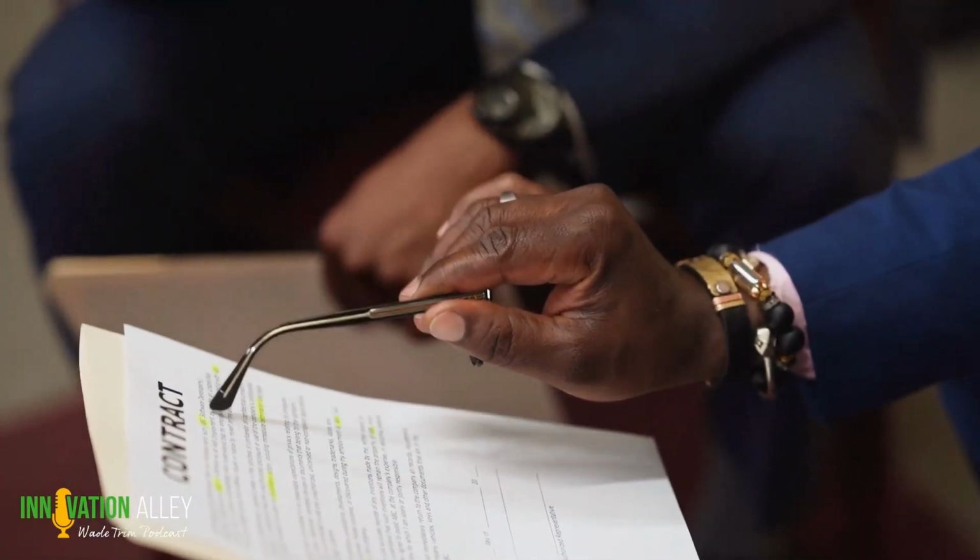And in reality, what they really needed was progressive design build, because they didn't want to spend a lot of money on a DCP package, a design criteria package. What they wanted was to get to market and get somebody on board to start designing. I was able to help them explain how that worked within the law, and provide them some contracts and some RFPs that were written around that, which they could copy.